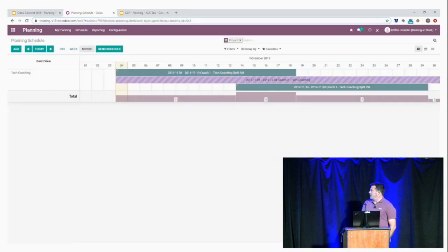Again, once we go ahead and hit close, we're going to see what that looks like. So again, it looks like in the middle of November, I have 3 projects going. So I don't want to schedule anything that's going to start around there. I want to start it towards the end of the month, and you can see that at the end of November, I now have 1 project because 1 has ended. Again, this is a small example of what's possible.